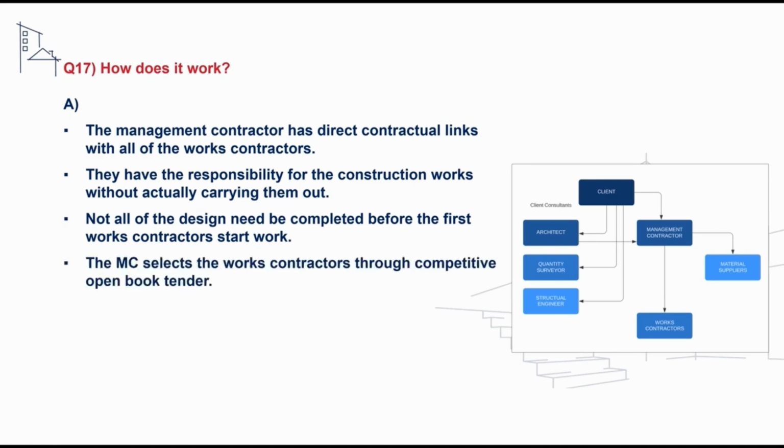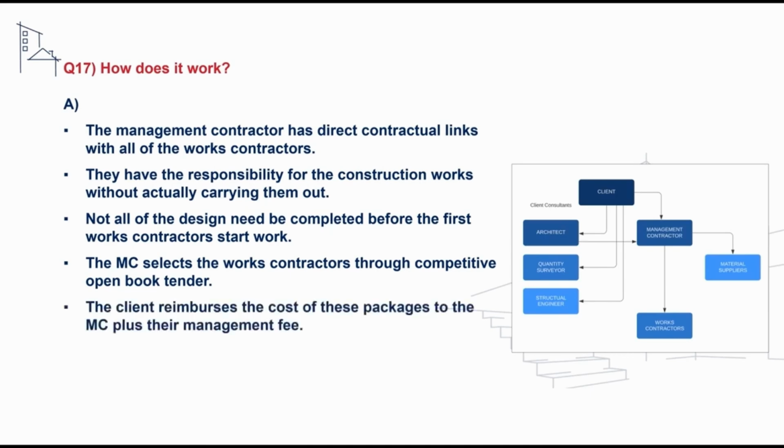The management contractor selects the works contractors through competitive open book tender, and the client reimburses the cost of these packages to the management contractor along with their management fee.